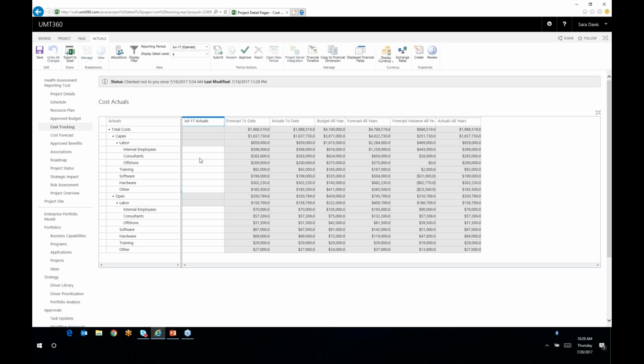That rarely ever happens. The second is it can be updated natively from the timesheet information captured in project, but the most common way is leveraging our data exchange to pull in the committed costs from the ERP system of choice, SAP, PeopleSoft, whatever it may be. So in that monthly process, or whatever it may be, you're going to run that data sync from the ERP system. The actuals will be populated across all in-flight projects, and the project manager will see that and can add his or her accruals.